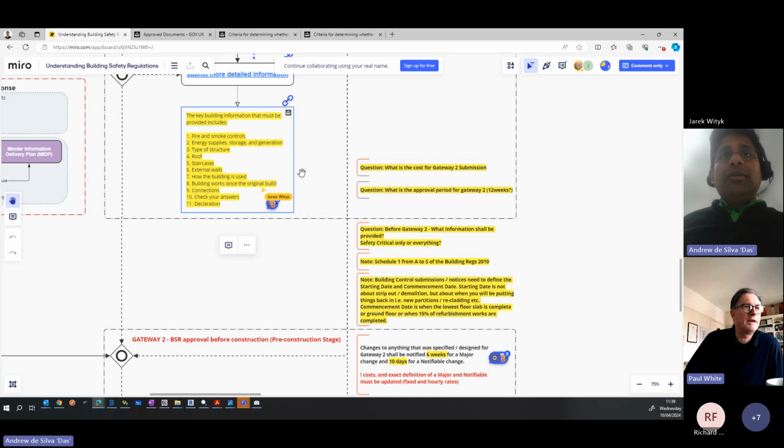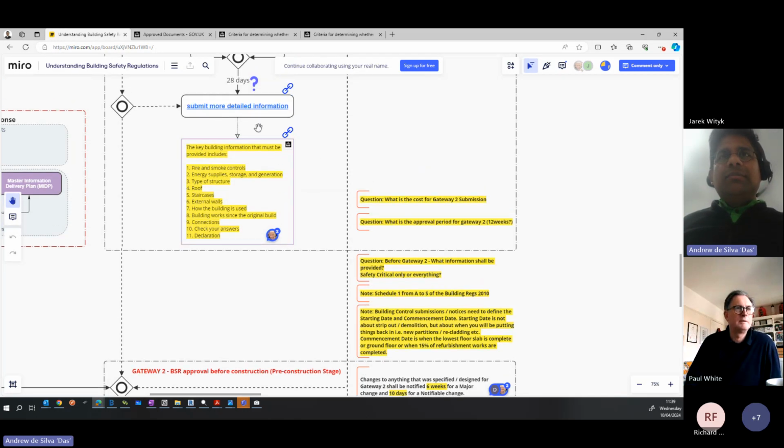No, we are. Sorry, there's an open question. Initially we had, Jarek and I, this list here, but reading this other document, which is another kind of specialist contractors' guidance, this key building information is referred to as something that needs to be submitted 28 days from when the building is registered, i.e. after the project has got the building completion certificate.